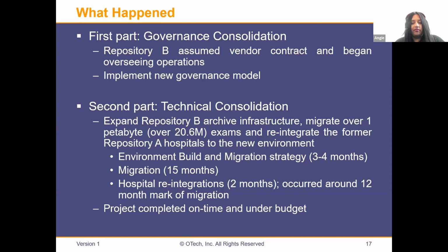And so the team, we did have to take a reset by the 6-month mark. An options analysis was completed and a decision made to move the storage and basically rack it in the destination data center. Now there was careful coordination and some costs involved there, but they were able to be accommodated in the project budget. Essentially, this greatly improved the migration throughput and the estimate to complete for the migration portion of the project. So let's continue with the hospital reintegrations to the new environment.